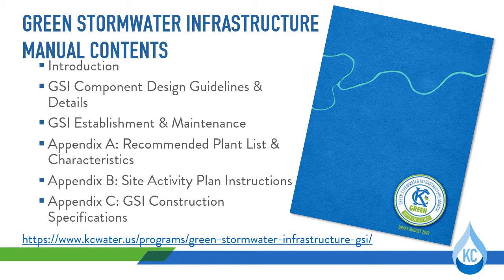The appendices in the manual provide the tools intended for use by the designer and contractor on developing contract documents. This includes a recommended plant list, the set of green stormwater infrastructure construction specifications, and instructions and tools for using the site activity plan. The site activity plan is a newer specification requirement specific to green stormwater infrastructure projects.